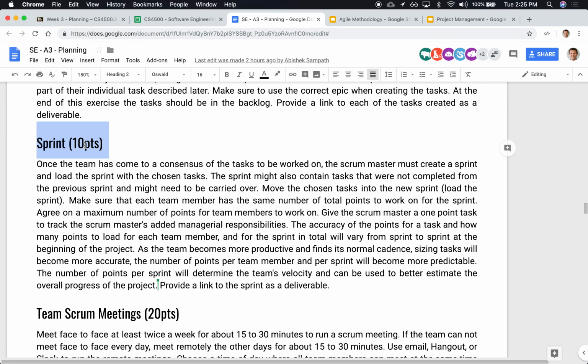We're asking you to use JIRA to create a sprint this week, and next week you have to create a new sprint, and every week you'll create a brand new sprint. This is the very first sprint of several sprints that we're going to be running throughout the semester. Typically, a sprint is a 1 week or 2 week time box that we all agree to work on these 10 features or these 10 tasks during this 1 week period. And during the week,